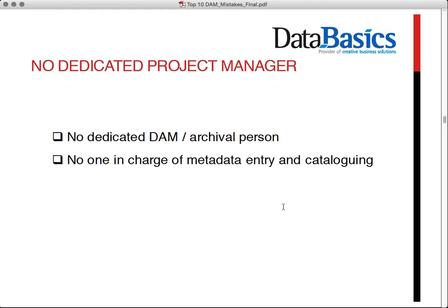Now then, some of the types of responses made here: no plan for accessibility of record of files, changes in staff led to reintroduction of system, no dedicated project manager. As you can see from the mistakes we've got highlighted on the screen here, this does bring into light the other need of a DAM project, and that is to have a data steward, often termed a DAM librarian, somebody who's going to oversee the management of the content of the solution.